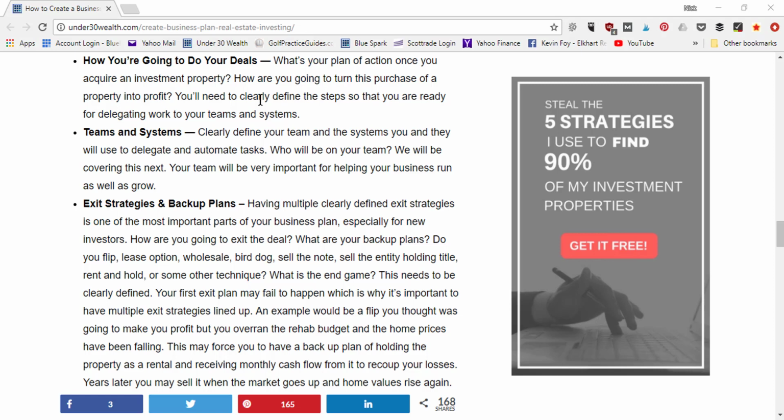So now you've got to have a step-by-step process of what you're going to do during closing. You've got that 30 to 45 day window, so you need to get inspections done. So you've got to talk to your agent, pick out all the inspections that you want scheduled. Then you've got to wait for the title to get checked by the title company to find out if there's any defects. You also need to get contractors in there to figure out what kind of stuff needs repaired. Get those contractors lined up and ready to get scheduled so that once you take over the property, they can get in there and start doing work.